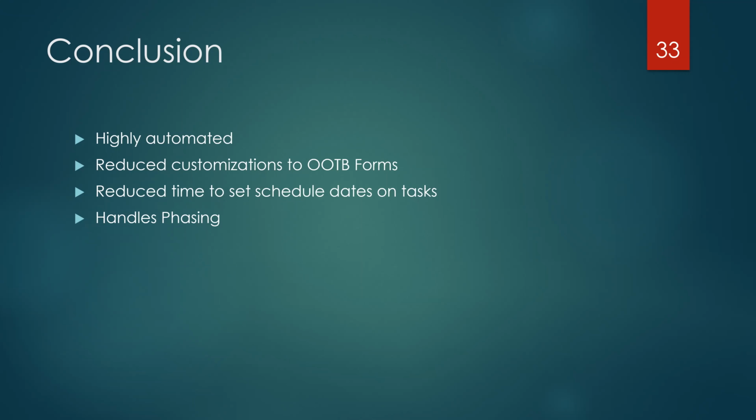And in the previous thing, with the FSM piece where I was showing you all the statistics, the idea of the statistics is to be able to look at what actually happened and do that over a group of similar change requests so that the manager can go back and say, you know what, we put down 10 days for this design, but we're seeing that every one of them is running 20. Let's go edit that task template and say now 20 is our default estimated days. So they can use that as a feedback loop to identify what they need to be doing.